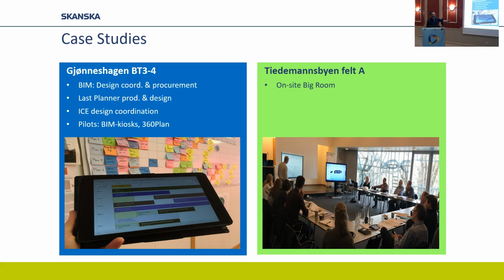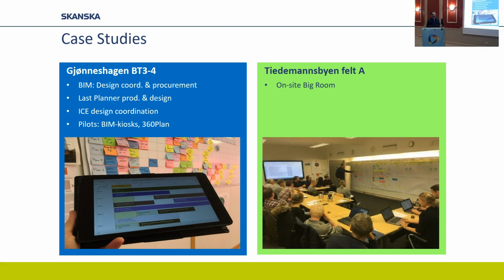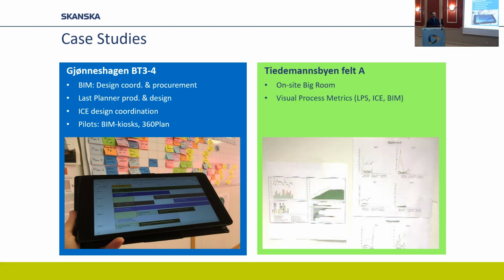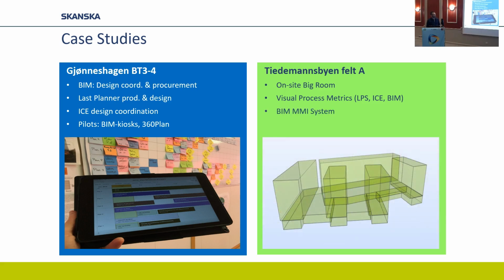The next project with the same team was Team Musbian, where we rigged it up with an on-site big room so that the team could work with those ICE sessions in a better environment. We had more focus on putting metrics on the wall, so we had metrics of the plan and the model, how it develops. We started pursuing the LOD system, or we call it MMI, because I think that's going to be the terminology that's going to grow.